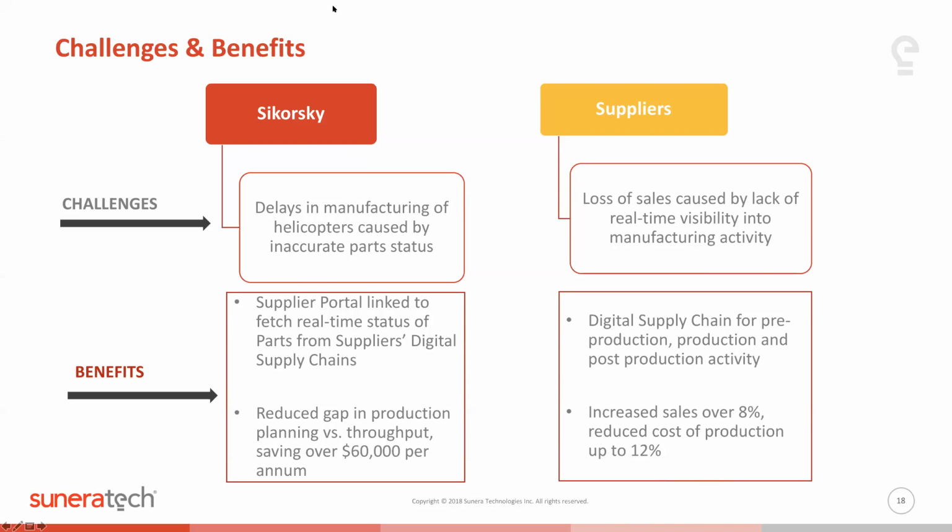So as far as the challenge that we were facing, all these delays that the customer was having were passed on to us. They would push out our schedules, which means a delay in us recognizing revenue. On top of which, they couldn't see our running live inventory, which turns out that now that they have access to it, we're realizing revenues much sooner because they can pull in dates because of this.